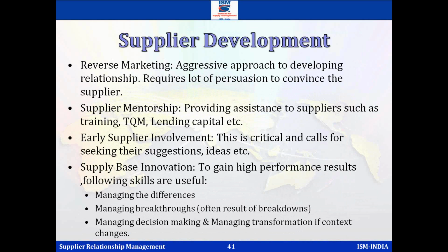So if I'm getting ESI, instead of making a design and then sending it to the suppliers, with the supplier telling me, guys, this will take you more time because your design is too labor intensive, if you make these changes, I can do it faster. So in the process, if I get ESI, earlier supplier involvement, I could have saved my time this way. I could have got their feedback during the design stage before I launch it.